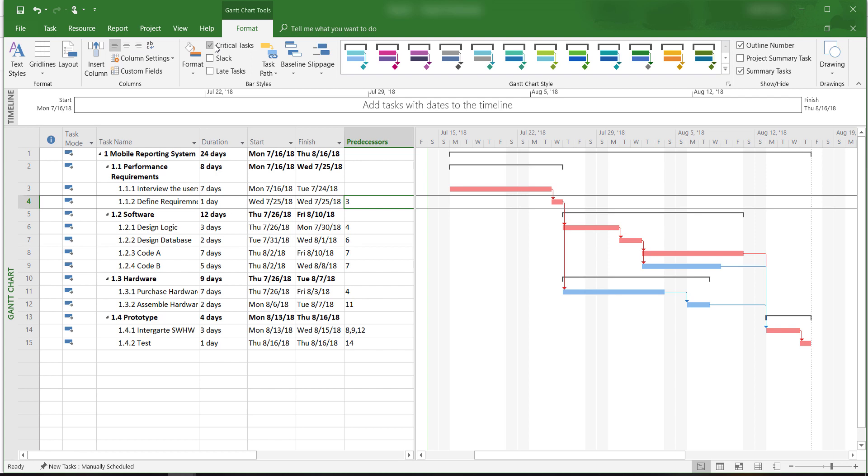This marks all of the critical tasks in red and the critical path is easy to identify. We can also change the Gantt chart style and pick different colors for task bars.